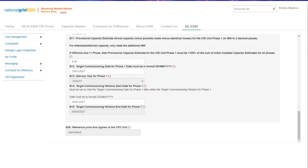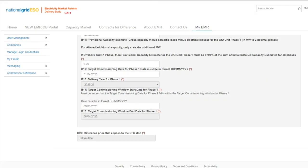Applicants will then need to specify the target dates for the proposed CFD unit. The target commissioning date needs to fall within the delivery years. We have examples of the earliest and latest dates that an applicant can have relating to the relevant delivery year. Next up is the reference price that applies to the CFD unit — this is a fixed field and will be auto-populated for you. Moving on to the cross-subsidy tab.